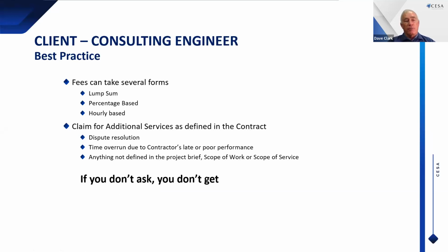The fees can take several forms: lump sum, percentage-based, hourly-based, and CESA has a practice note number 45, which describes each of these in detail. And if you're unsure, then you must go onto this website and look at that practice note.